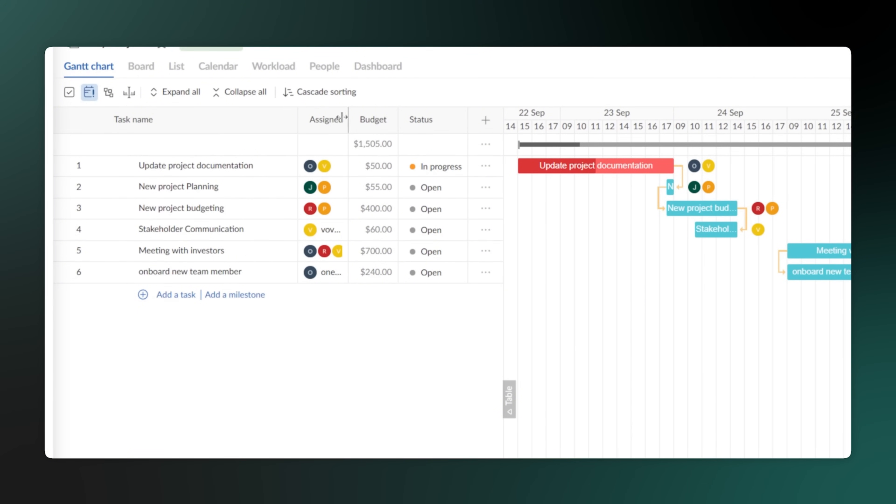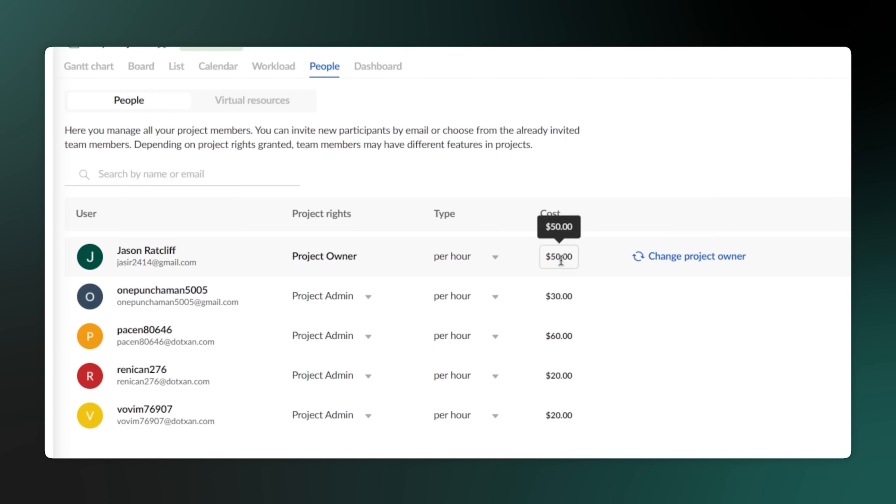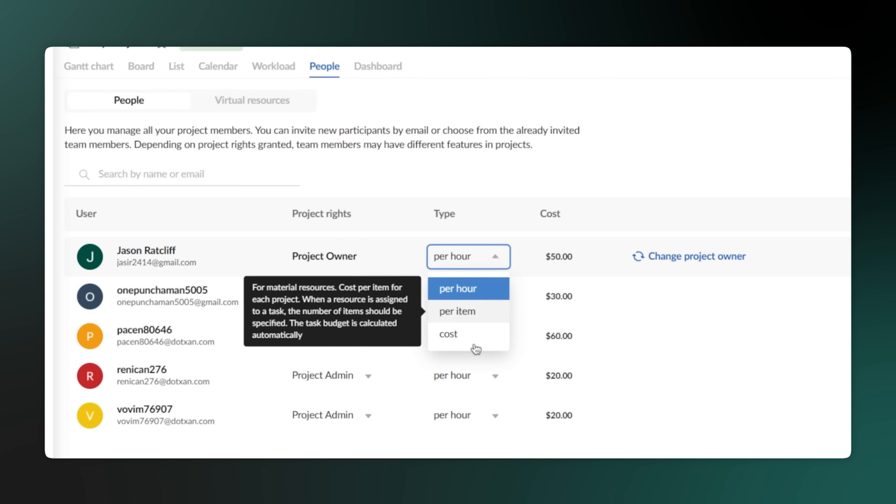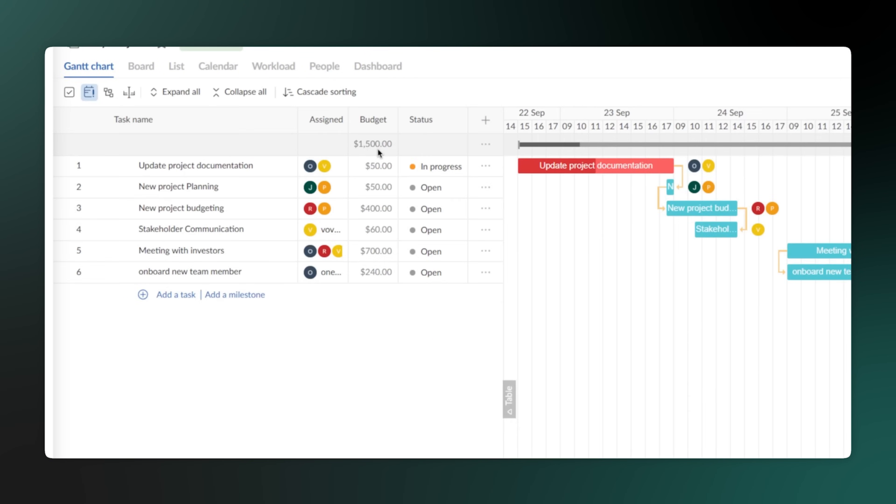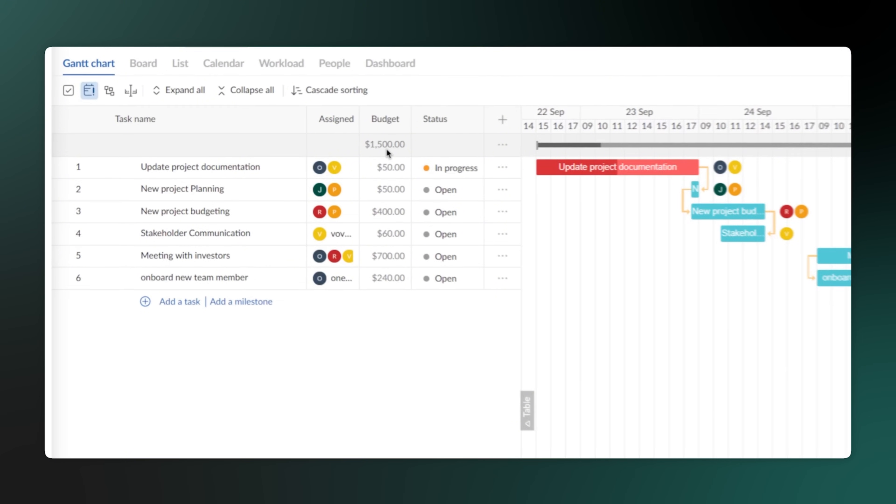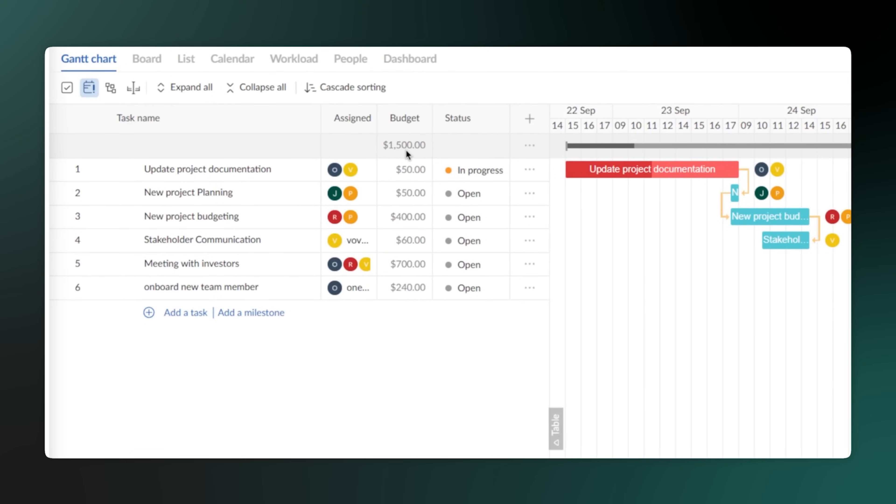You can input your costs directly into the platform, whether they're for specific tasks, a person's hourly rate, or a fixed expense. It automatically calculates your total project cost and shows it against your budget. This gives you a real-time view of your spending, so you can make sure you're staying on track. No more guessing or trying to track everything in a separate spreadsheet. It's all right here, in one place.